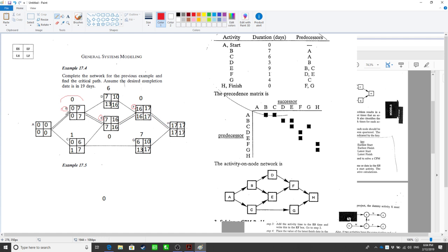So for those nodes whose slack time is 0, they are actually in the critical path. But how is the 0 calculated? It's actually this LS minus ES of the starting point. Okay. So it's 0.